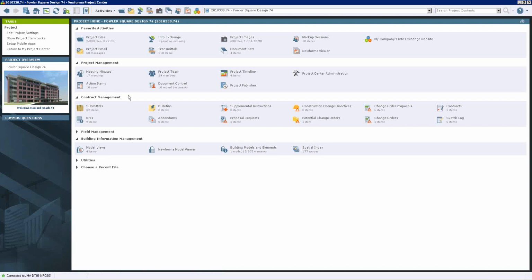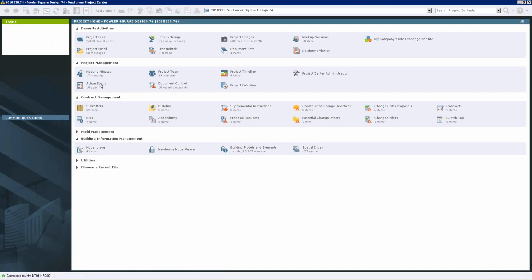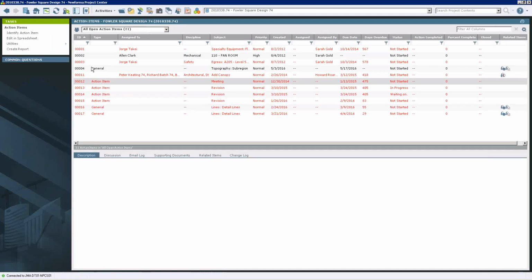So hopefully these areas will give you some accountability, tracking ability, and efficiencies, instead of dealing with a lot of different emails for keeping up with that kind of information. You now have the logs to track these action items, and people can go into an action item and update it, give you a % complete on where they are with that particular item.